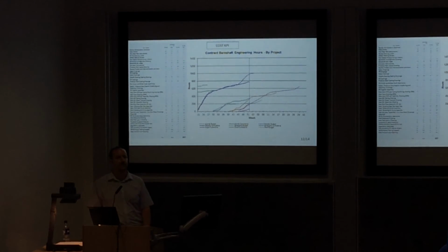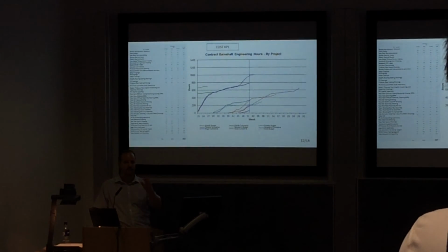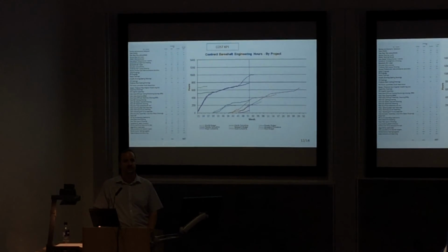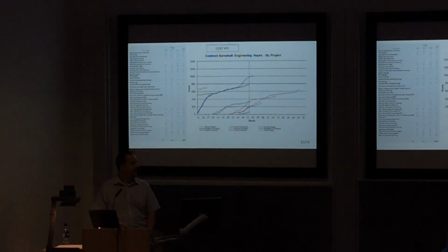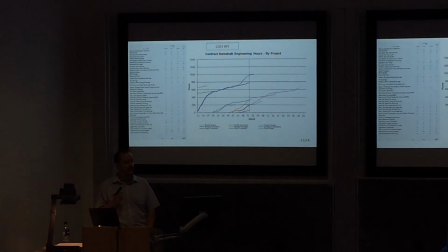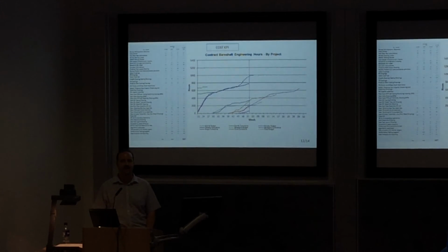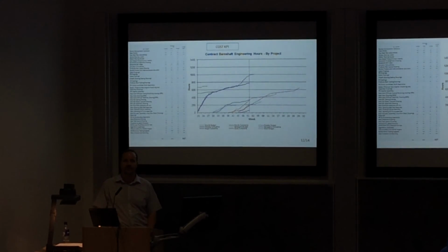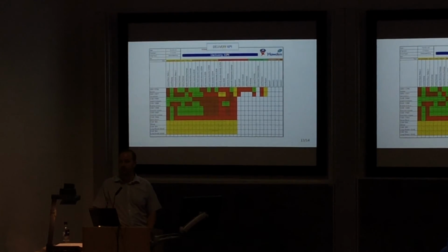And the reason for that was the sales team aggressively sold it with a small allowance for the engineering work, which actually wasn't possible to do in time. And we knew that. We still aimed for the budget that we had, but we never met it. Fortunately, we did meet it with various other jobs that year, and it wasn't as big an issue, but it is very important for managers to be able to see where we were overspending.